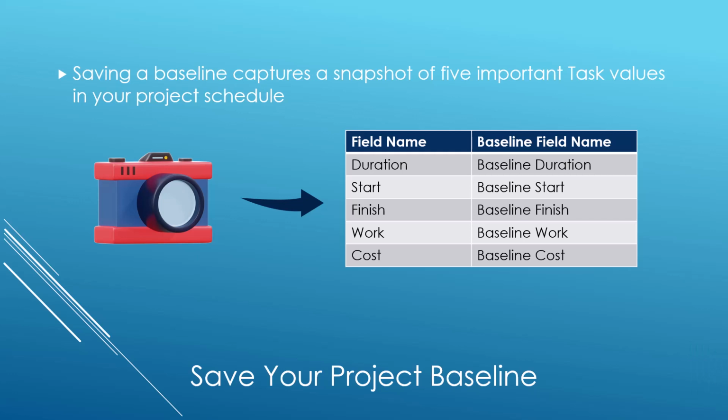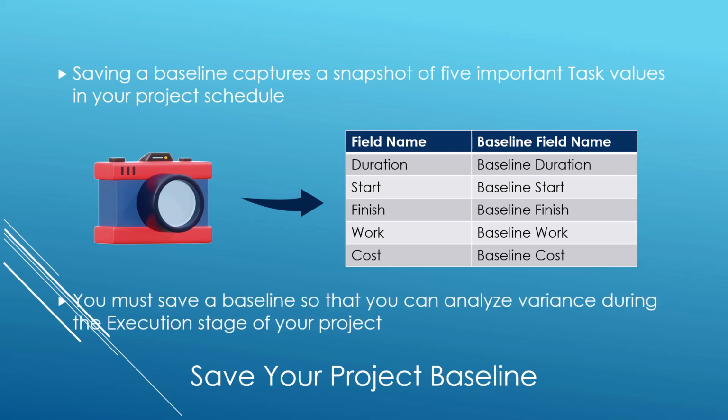So, for example, the software will capture the duration of every task and copy that value into the baseline duration field. So why do you need to save a baseline? The answer is simple. You must save a baseline so that you can later analyze variance during the execution stage of your project. So let's take a look now at how to save a baseline in a Microsoft Project schedule.